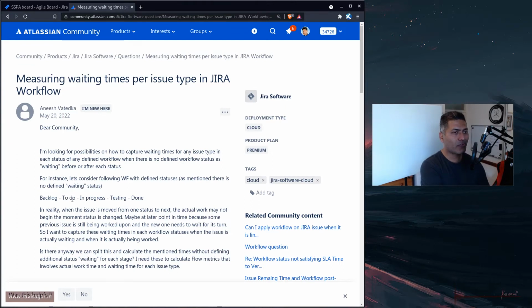To give you an example, let us say you have a Scrum based approach, and you're following sprints. Every day you are supposed to do those regular catch up, stand up meetings, Scrum meetings, where you ask everyone in your team, how is everything? Are you doing well? Is something blocking you? What are you going to do tomorrow? During that meeting, you should look at the burn down chart, because the burn down chart will tell you the progress on a timeline.